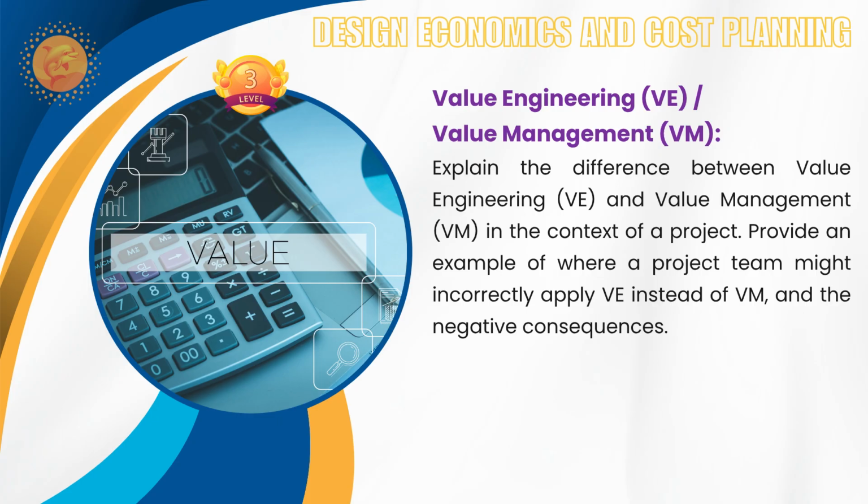But when it comes to value engineering, when you move with the project during construction, if you incur any value engineering exercise because of material scarcity, or specialty unavailability, or some particular restriction in logistics, you are finding alternative methods or materials. At that time the cost may be high. Even though you are trying to minimize, it will be very difficult to achieve the value if you are doing it at a later stage.